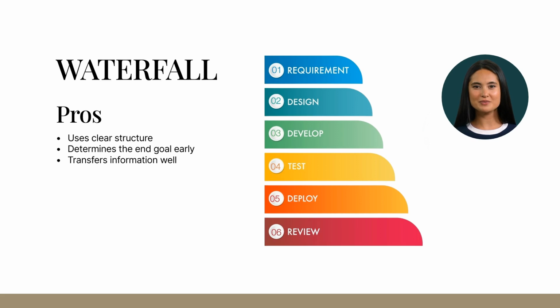Maintenance/review. The waterfall approach requires teams to finish each step before proceeding to the next, promptly revealing any roadblocks. This minimizes the likelihood of unfinished projects being neglected, ensuring a more comprehensive and polished final result. The progression in waterfall is both clear and intuitive.